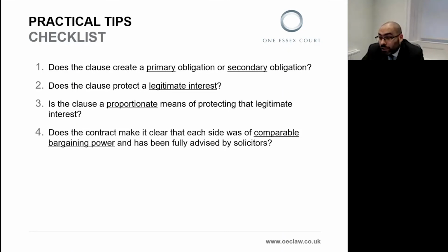Another possibility from Holyoake and Candy is to include a liquidated damages clause in a separate agreement, such that it arises on the condition of breach of the first agreement, not on breach of the agreement in which it is contained. That makes it a conditional primary obligation.